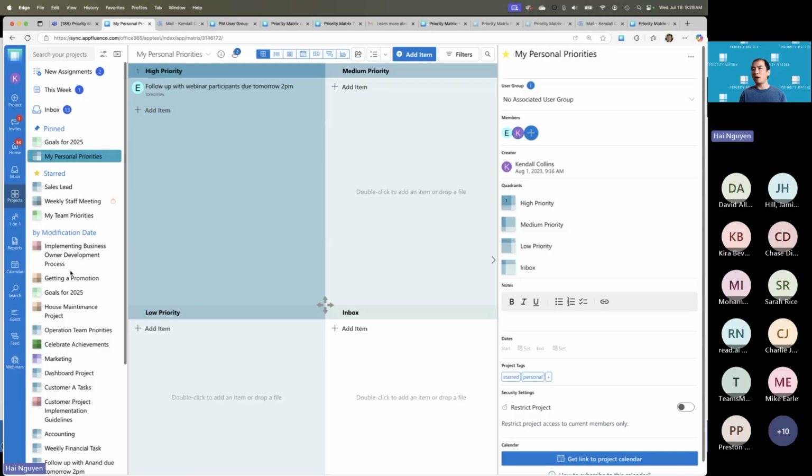But what are the kinds of projects that I typically see? First, there's something called a transient project. Let me give you an example. When you create a project in Matrix, perhaps it's a construction project over the course of 18 months. What that means is it has a start date and end date, and therefore your goal is to finish all the tasks, right? That's an example of a transient project. You might also have something called a persistent project, which is one that lasts forever. For us, for example, we have projects for each of our applications: our Mac app, Windows app, web app.